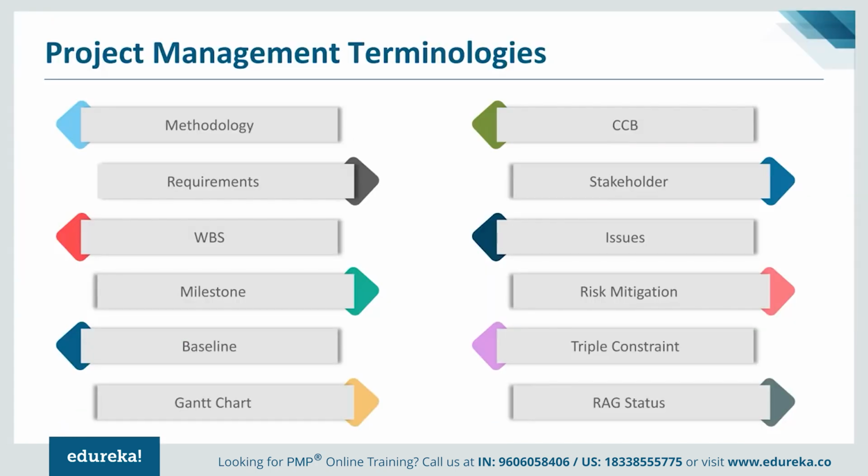The next topic is about CCB, which is Change Control Board. I mentioned requirements gathering and baselining. The Change Control Board comes into the picture whenever anything you're doing is beyond the baseline. So if a requirement is baselined and now a change is introduced in the project, then it has to go through a change control board. In the change control board, you will have various stakeholders. Of course, you'll have a project sponsor, a requester of the change, and representation from the IT side as well.